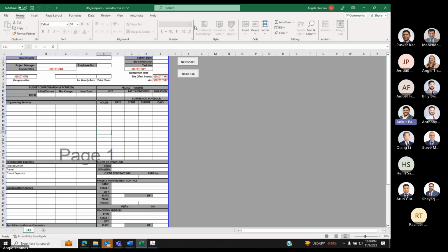And then one of the columns, I think you're supposed to put the overhead rate. So what I had been doing is putting whatever overhead rate was assigned plus the profit as the percentage. Is that correct? In most cases that's tied to whatever contractual rates we have. We have a mix of contracts that have our audited rate, and contracts with a different proposed rate at the beginning that we're stuck with. So you should talk to the contract manager in those specific instances, because it does vary project to project.